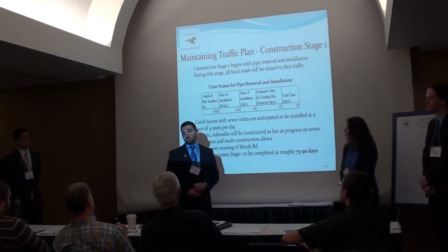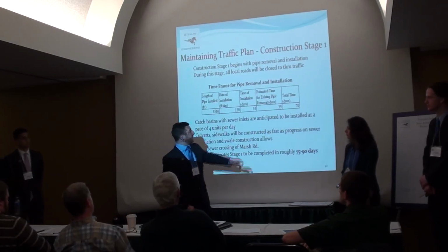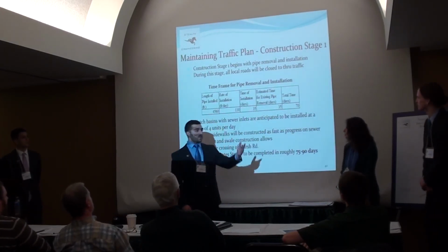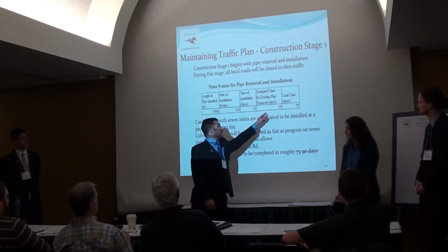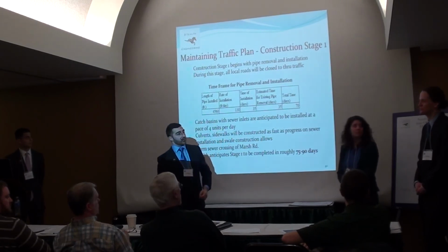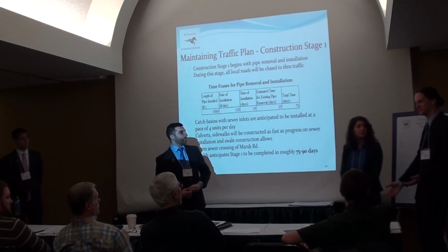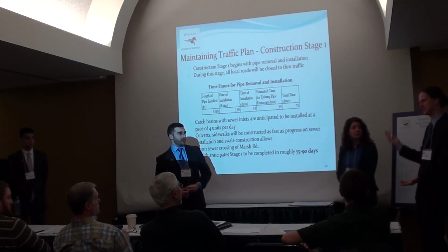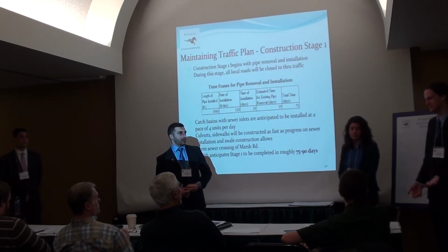So what's the potential impact there in terms of your time estimate? Would you revise your time estimate based on that? Yeah, with further discussion with hydrologists, and to be honest, we didn't get to that point. This number here would probably be lower. However, we would have to remove the pipes for where we designed the first 2 detention ponds first so that we could build the detention ponds. So this time could be closer to accurate since I don't think we'd be able to remove and place at the same time.